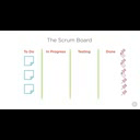Not only does this clearly communicate who is currently responsible for an item, but it also helps discourage multitasking. Each of us can only effectively work on one item at a time, so each of us only has one push pin to represent that. If you're working on one item and you need to pick up a second, then you must remove your push pin from the first item and move it to the second item. You should then put the first item back into the To-Do column at the top, signaling that someone else may pick that item up. Don't worry, there are plenty of unlabeled push pins to hold items to the board when no one else is actively working on them.